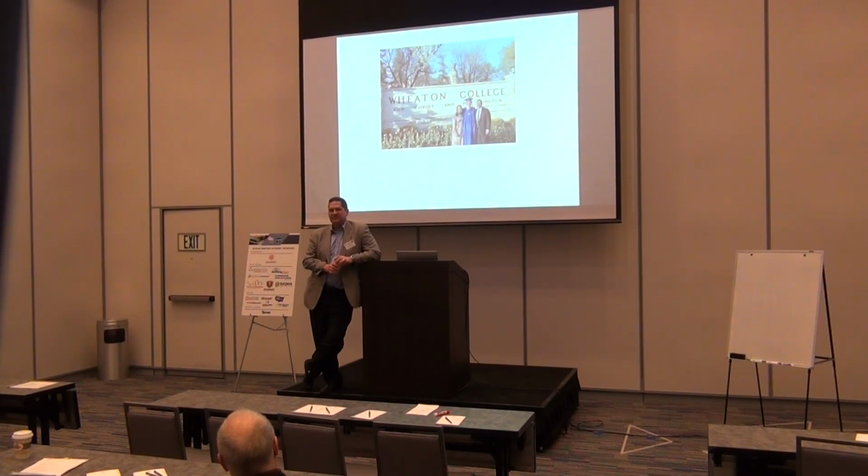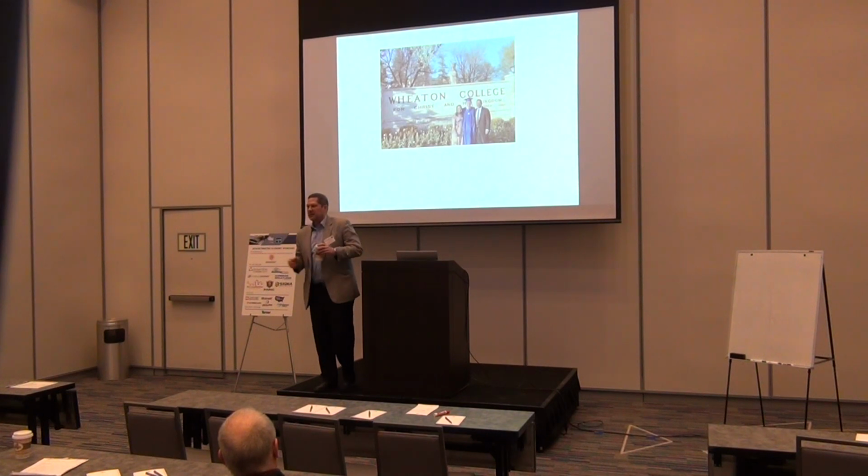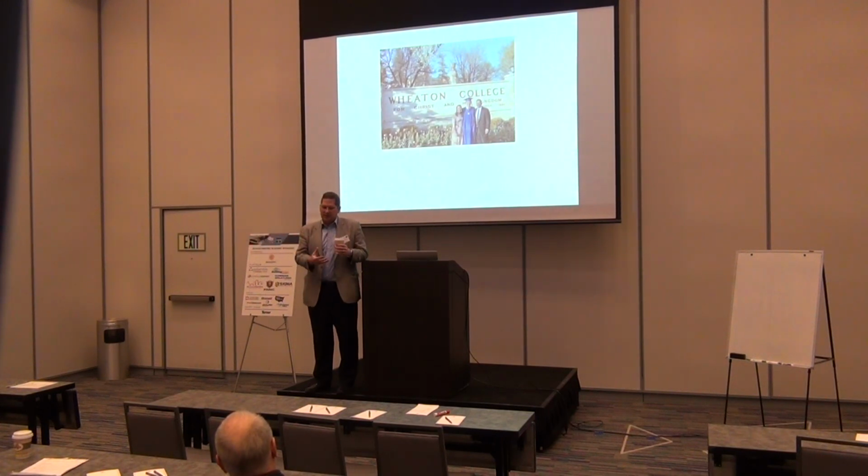Any other questions? Maybe redundant, but I didn't catch the pay if paid versus pay when paid. Could you help distinguish the two a little better? Sure. So the typical AIA says that that's the pay when paid. And what it says is you'll get paid when I get paid, which means I'm going to get the check and then I'm going to turn around and write all my checks to my subcontractors, right? And it says usually you're going to get paid within 7 days or something.